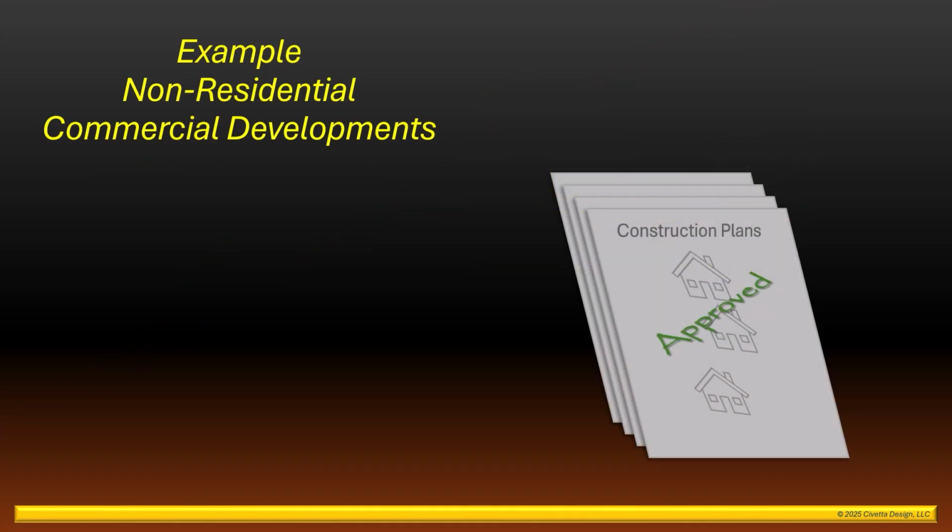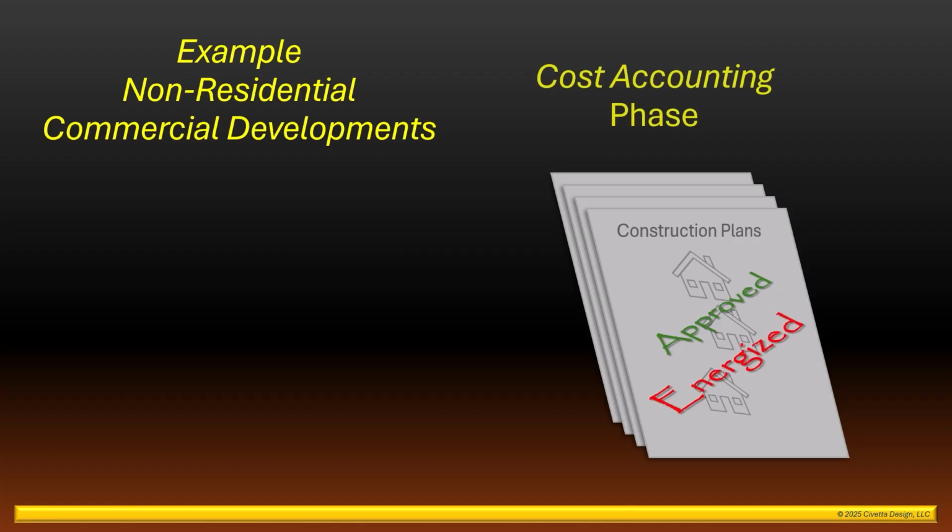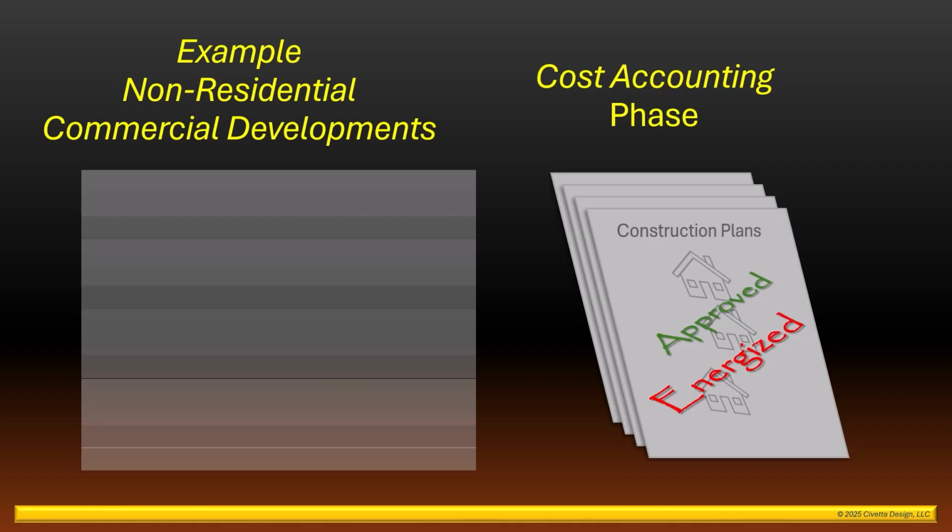When the construction was completed and the system was energized, the project advanced to the final stage, the cost accounting phase. During this phase, the utility reconciled the final costs of the project, entered the new assets into their rate base, and began the process of billing the new customer for the service of providing electricity. Let's look at the applicant's total investment in the project.